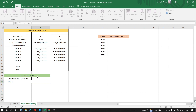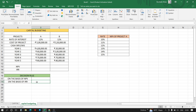Then we have to choose which project the company will select based on NPV and IRR. Remember, the greater the NPV, the better for the company; the greater the IRR, the better for the company. If NPV of A is greater, project A will be chosen, or else B. In the second part of the question, we calculate NPV of project A at rates from 10 to 15 percent.